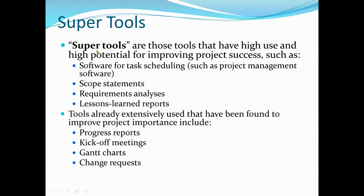Super tools are those with high use and high potential for improving project success, such as software for task scheduling — for example Microsoft Project, which includes Gantt charts, critical path analysis, and network diagrams. We also have scope statement and requirement analysis, which is very important in IT projects, covering both functional and non-functional requirements. Tools extensively used that have been found to improve project performance include progress reports, kickoff meetings, Gantt charts, and change requests.